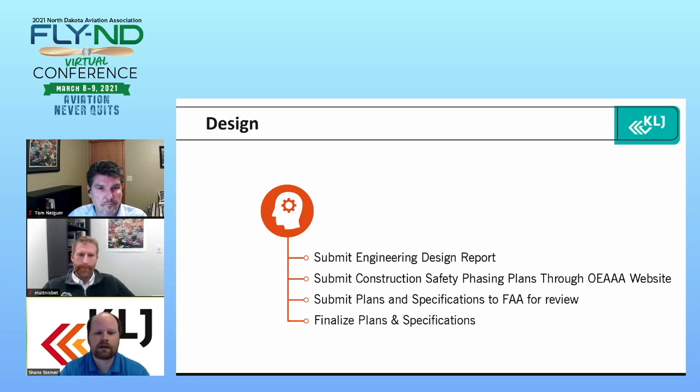So now that we're getting into the home stretch where it's time to submit the final plans and specs to the FAA for review and comment. Typically the FAA is going to ask for these roughly 60 days before the advertising of the project, and this gives them time to do that review.